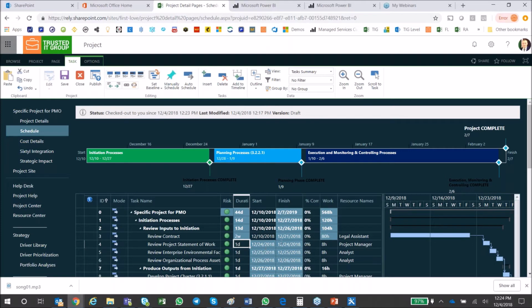And look at the highlighted items here, meaning that whatever you see highlighted is based on this action that I did, which was changing the duration from 1 day to 2 weeks. It changed all these dates based on the dependencies. So now I have a completely different schedule, with the estimated finish date of the entire project being pushed from January to February, and on and on.